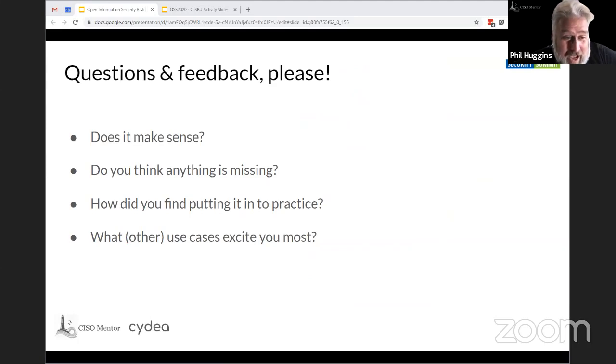I see Alan in the chat has just asked about risk aggregation. I think this helps. Once you have a common language around events and consequences, you can start making better statements around the total risk that you've got. But again, if you're talking about aggregation, you're talking about aggregating likelihood and impact. That's an analysis job, not an identification job. And I'm quite keen to keep the risk universe separate from the analysis method, because there are so many of them and everybody's got their favorite.